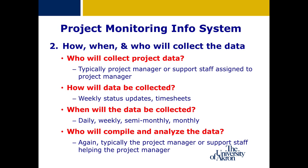It's something you have to weigh and determine whether it's appropriate for your project. Data is typically collected weekly — that's what I've found to be the most effective time frame — done through some type of detailed timesheet noting the project task. If data is collected manually, collecting anything less than a week is almost prohibitive; you'll never be able to get the project team to provide daily reporting. Many automated tools like Microsoft Project Server allow the project team to enter their time themselves through defined project tasks, and you as the project manager can pull this data out through the system tables.